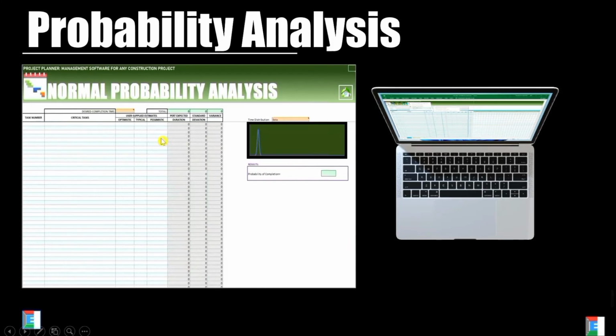Probabilistic time estimates, also known as probabilistic activity time approach, refer to a method under Project Evaluation Review Technique, PERT, which predicts and estimates accomplishment duration of events or activities in operations by an approach called three time estimates. This approach facilitates the calculation of mean and variance of the beta distribution of time of each activity. It is assumed that beta distribution is an efficient way to approximate activity duration. Beta distribution in graphical representation is continuous and seems like bell-shaped curvature in skewed form.